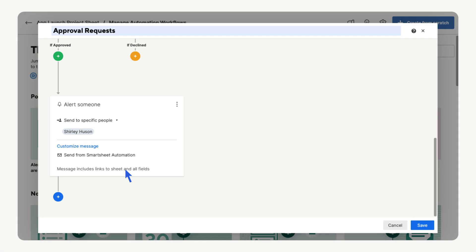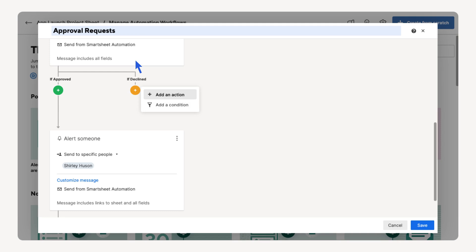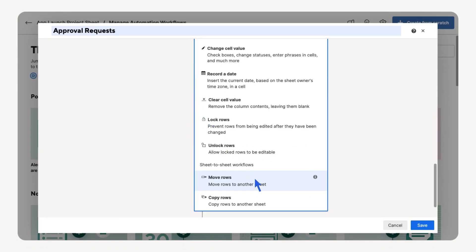And finally, let's set up the archive workflow. In case our request is declined, we'd like to move any rows of data that are declined to our separate archive sheet. Select Add an Action, then scroll to find the Move Rows action.